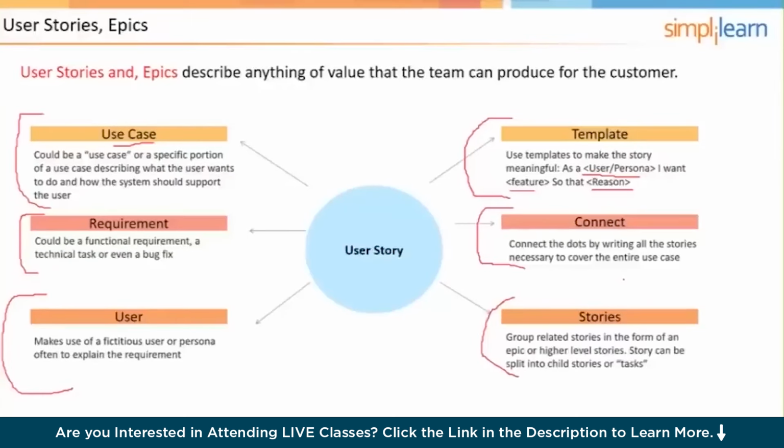Like in the question that we had at the end of the last section, where the product owner needed something done and the team said, well, based on the size of this user story, it's going to take 3 sprints to do. Well, a user story has to be small enough to be completed within a single sprint. So a sprint can contain more than one user story, but a user story cannot span sprints.